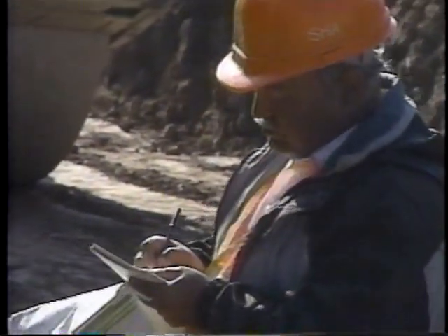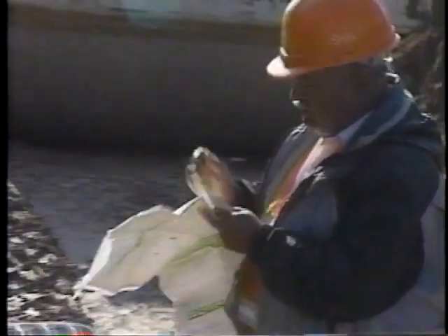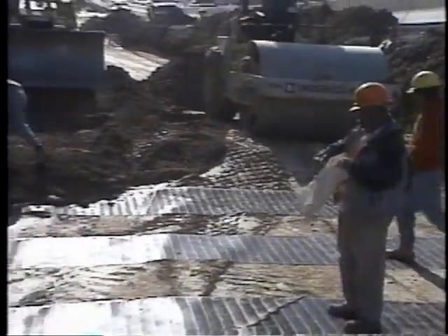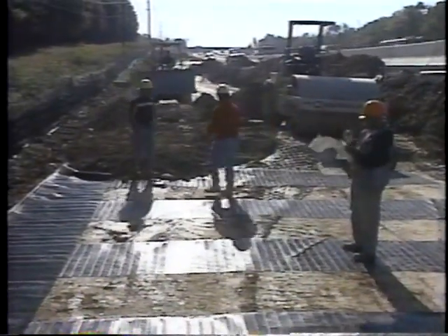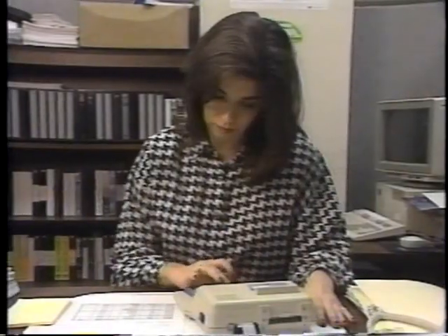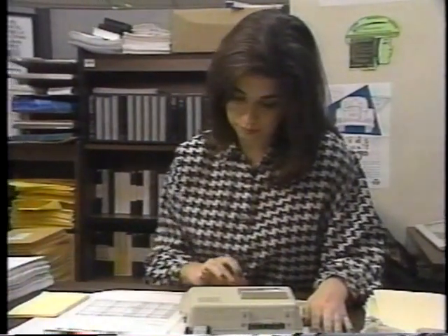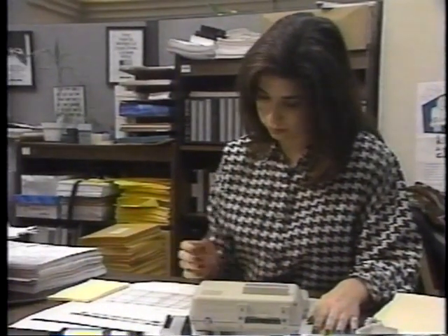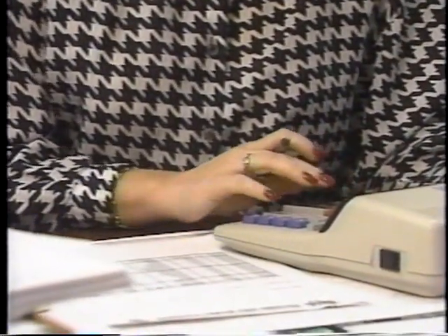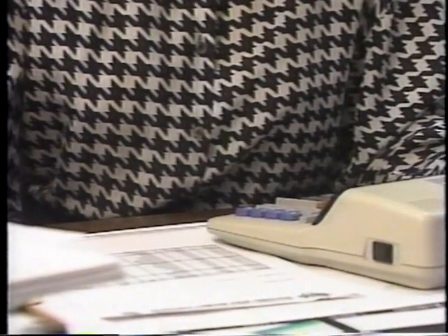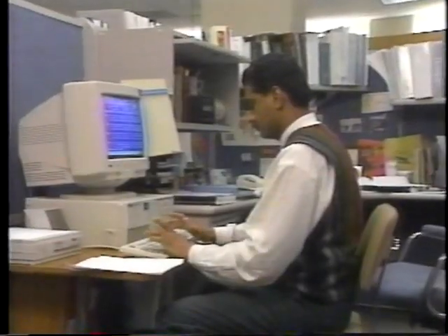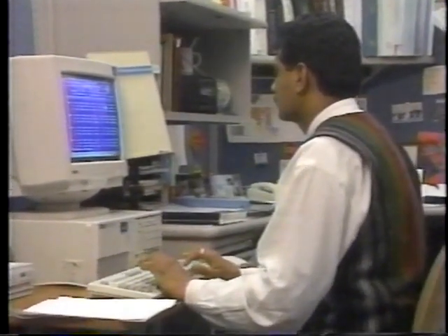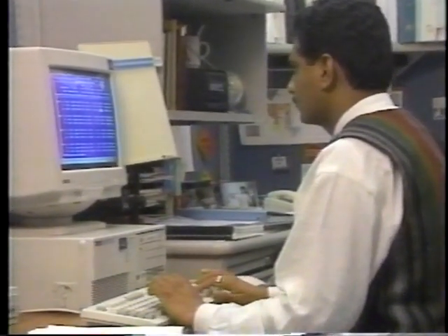In the planning element, the number of man-hours and man-months are determined. Standard planning values are determined for each contract type and multiplied by the number of units involved, resulting in total man-hours required. The total man-months required are determined by dividing total man-hours required by available man-hours per month. The monthly needs are determined by distributing the man-months over the contract period.